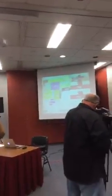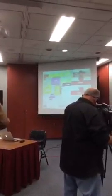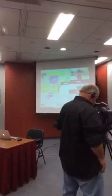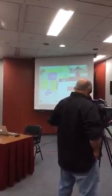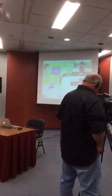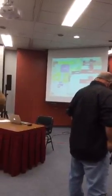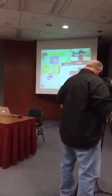Looking at the phasing plan, last time I was here, you were occupying the social studies rooms, which are being occupied now. The guidance office is finished except for a section of the floor here which ties into the work that's going to be done over the summer. Work has started in the purple area here, which is the Ox Gym and the team rooms. And starting April 1, we'll be moving into the auditorium and the DAO, which is here. As a matter of fact, now that Mr. Cardwell is ahead of schedule moving people out, some work may start in here this week.